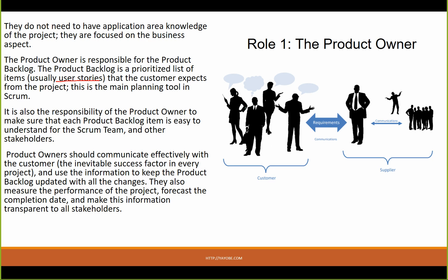The product backlog is a prioritized list of items, usually user stories. For example, customer registration, customer login, customer logout — each is a user story. This is the main planning tool in Scrum. The product backlog defines what the customer expects from the project.